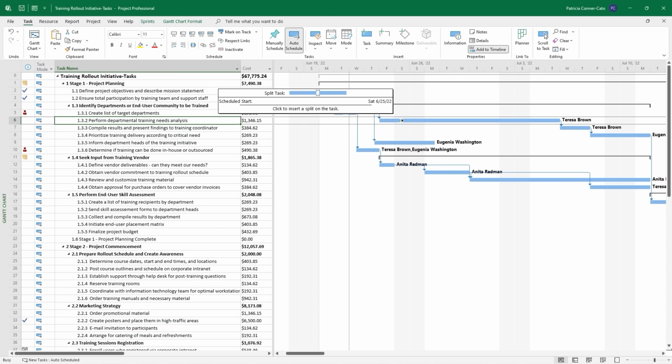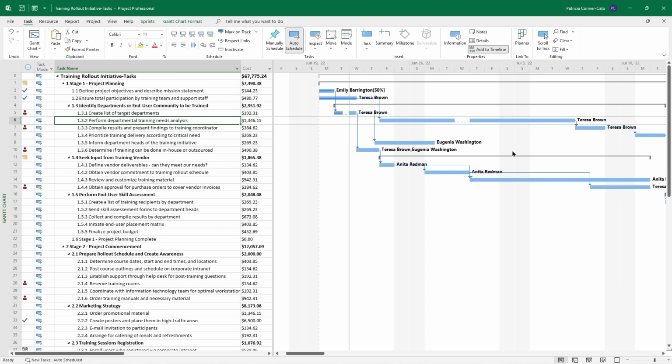And then I'm on Saturday, Sunday. I'm going to get to Monday. So she worked on Friday, Monday, and Tuesday. And when it gets to Wednesday, the 29th, I'm going to click my mouse on that bar. And it splits the taskbar. Now, it only split it for 1 day. So in the scenario, she's having Wednesday and Thursday off sick.